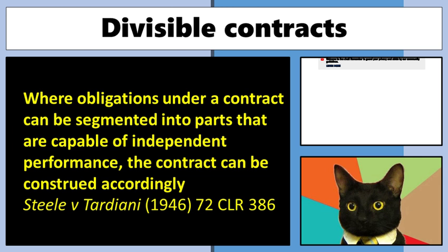And so you guys are going to have to leave that in the back of your mind. If a contract can be chopped up, courts are willing to do it. But in some situations they can't. Building three quarters of a bridge is not going to get you three quarters of the money. Does that make sense as an example? If it's fundamentally not something that can be divided up.